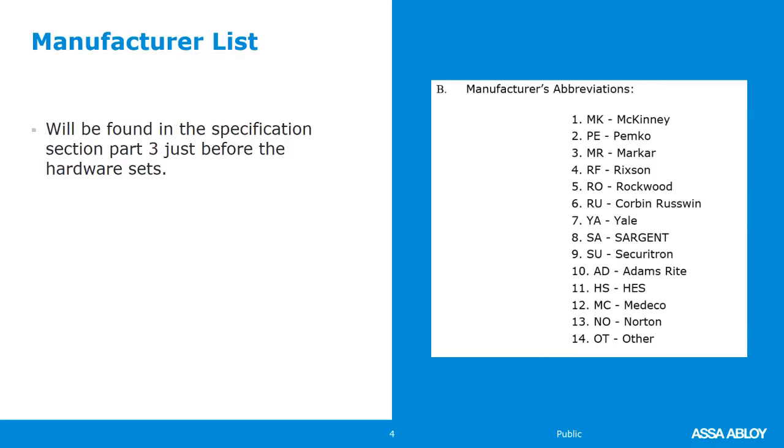We also did mock-ups. Once the specification was written, before it went out to bid, they had areas mocked up. The contractor built an actual operating room. They built a patient bedroom, and they built some typical rooms off-site so that nurses and doctors and staff could come in and look at things and see the space and make sure that everything was the way that they intended it to be, so that we could make any corrections.